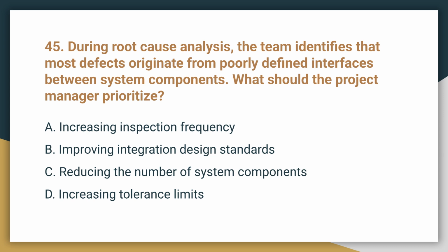Question 45. Root cause analysis shows most defects come from poorly defined interfaces between system components. What should the project manager prioritize? The correct choice is B. Improving integration design standards. Addressing the design process prevents recurring defects.